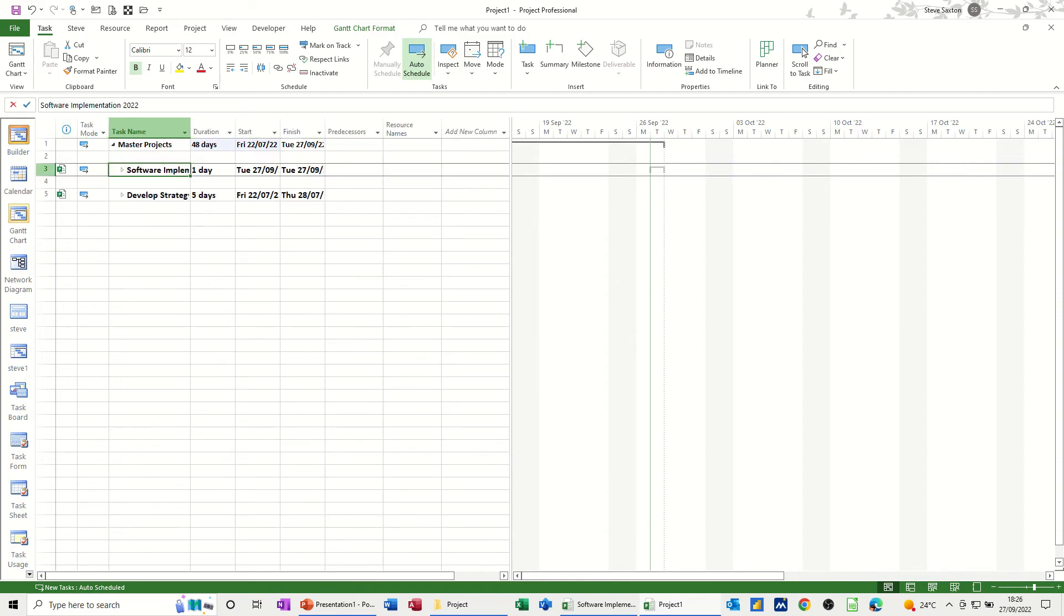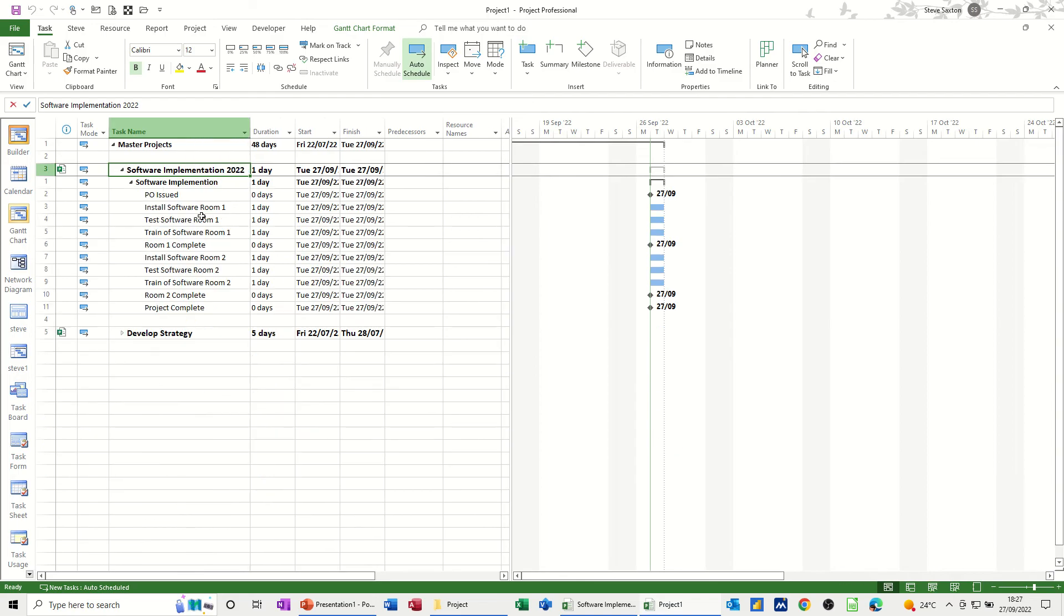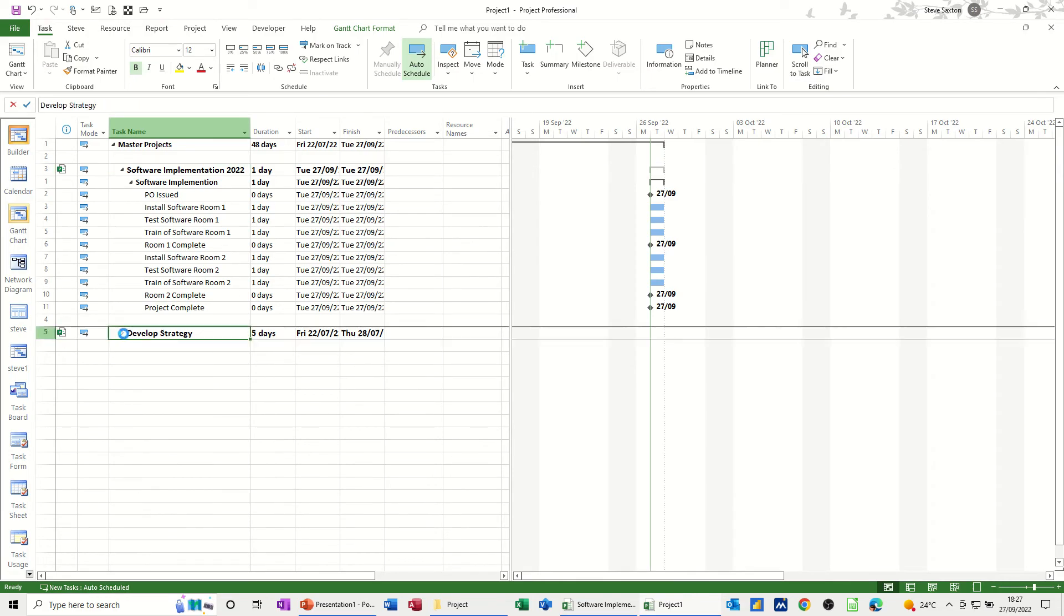So I open up project software implementation. This is the actual project, so any changes I make here will be reflected in the source file. Likewise with this one, any changes I make, so if I change the start date on any of this for example, it will reflect in the source file.